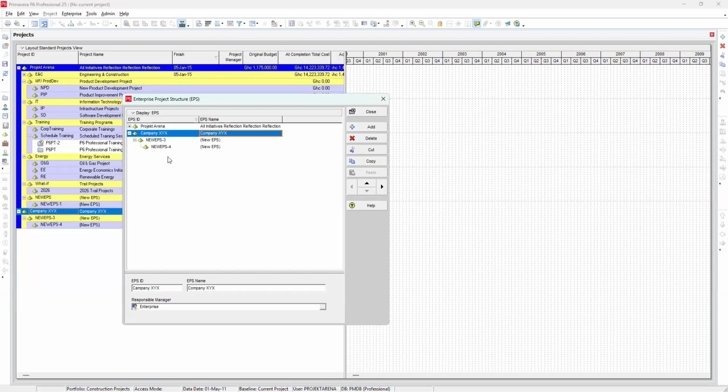So maybe you do a marketing activation project. Under marketing activation, there are some sub-projects under it. You do maybe an ERP system for finance and HR. You can create finance and HR projects, and then you create your project structure. This is how the EPS is created.